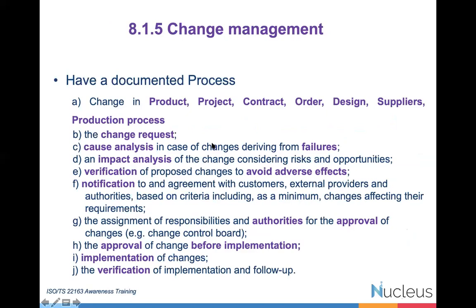Then the change management. We have discussed this a lot in the initial stage. Any change in product, project, contract, even customer order requirements, design requirements, supplier requirements, every change needs to be analyzed for the impact and verified that the changes are not going to affect the product. Then notify the relevant parties, and the proper authority needs to approve the change before implementing. These are the very crucial change management requirements in ISO TS 22163.